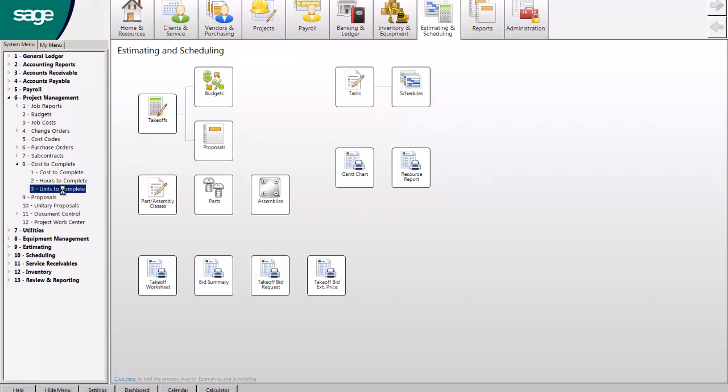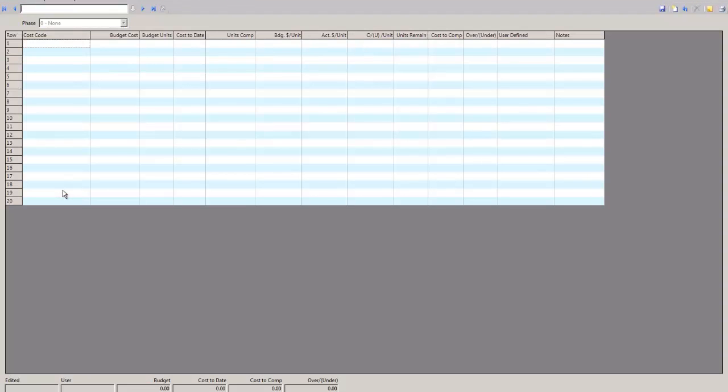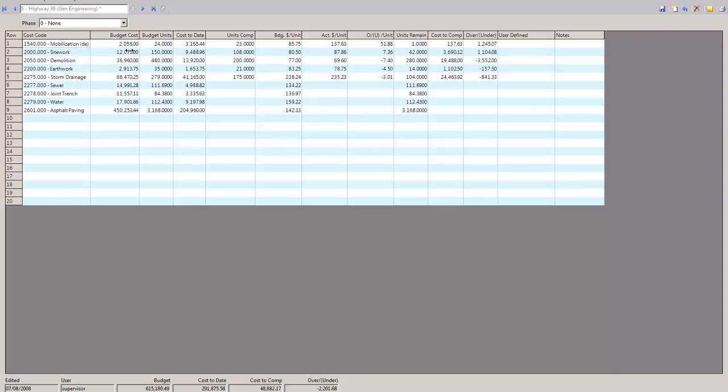The way I like to look at it, and my background is heavy highway, high production, concrete, I like to look at unit cost. Again, this could be pull wire, terminate fixtures, whatever you want to put in here as tasks. This is the budget to do that. Again, can come from Excel or our estimating. This is how many units I had to do. This is the cost from your vendors, inventory transfers, equipment costs, whatever.